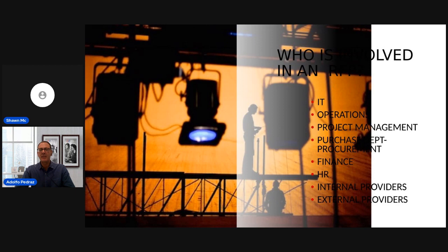Why do we mention the HR department? The reason is that normally when this type of software is deployed, it affects the shifts and the way in which the agents come to work, the time they start, the time they stop, what happens between shifts, etc. So most companies want to make sure that whatever happens with this tool respects the legislation related to human resources. That's why this department comes into play.